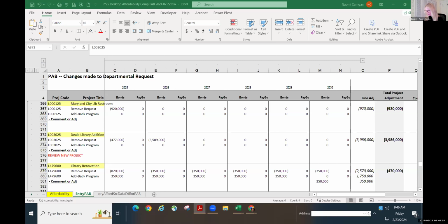Bear with me here, I'm just clicking through some screens. I made a note. Maybe David Braun has an idea of what the full cost is. I think there is additional cost that will be coming online in fiscal year 31, but I'm not sure of the dollar value. Yes, the $41 million total project cost is the 41 million you mentioned. What's shown in FY30 right now is half of the construction costs, with the other half being planned for 31.